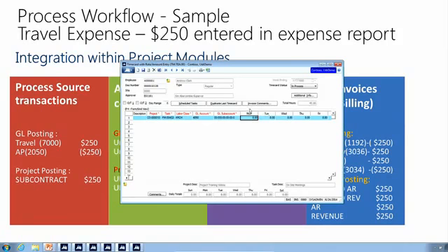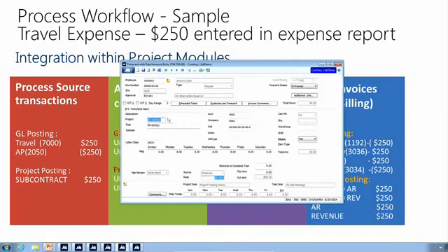So in this post, it will generate a cost. This timesheet with rate and amount is nice because we can see the cost in here as well. So this is a different view of the same screen, but I see my 8 hours, and the cost rate is $20 per hour, so the extended amount is $800. So that's how much that cost will come up with when the time card is posted.